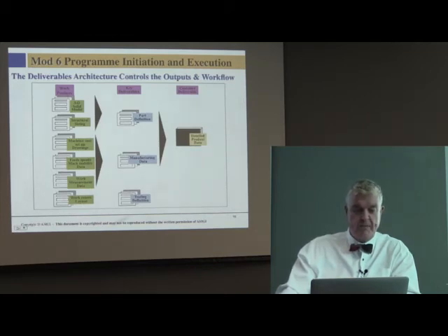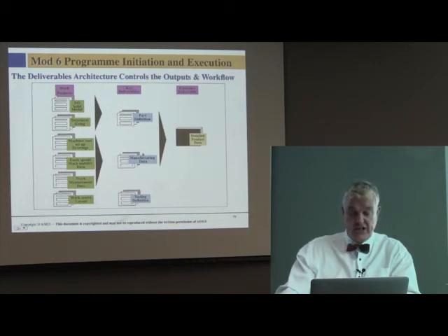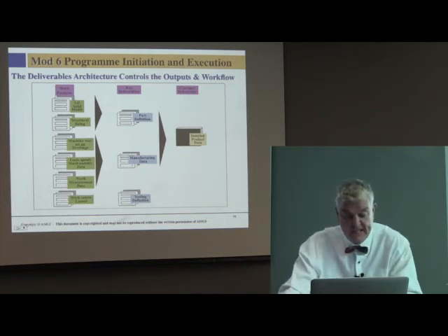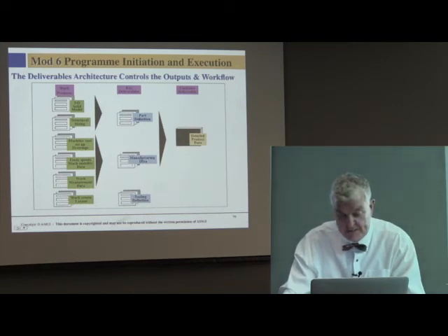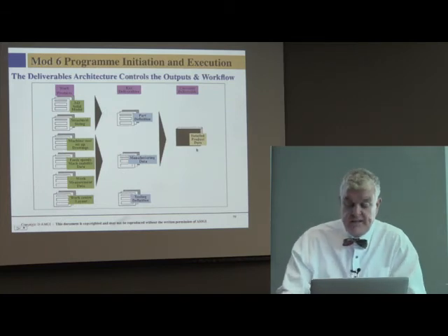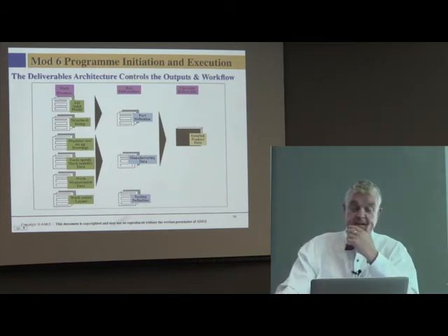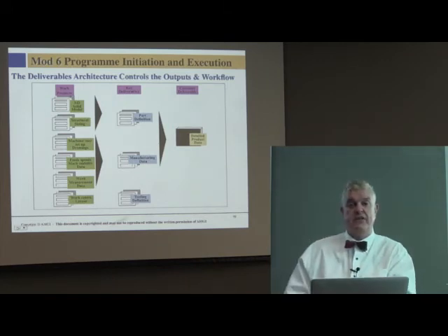So you have to have these work packages, and a deliverables architecture. So this, for example, the part definition is made up of a 3D model, structural sizing. That part definition and manufacturing data, that's the machine tool setup drawings, the feeds, the speeds, the work measurement data goes to the manufacturing data. So the part definition plus manufacturing data, including the tooling data here, would give you the detailed product data. So that's your customer deliverable, that's your key sub-deliverable. So there's an architecture of deliverables that you have to track.